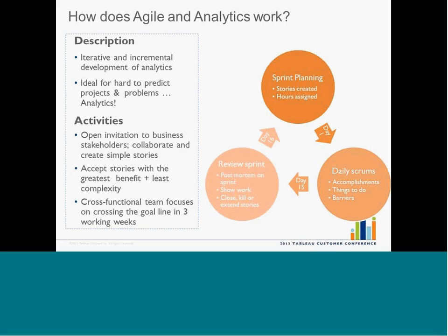So what we do is we set up a sprint planning session for an analytics project. We create the stories, we assign the hours, and the next day we start working. And every day we get together as a team and we figure out what are the accomplishments, what have I done today, what am I going to do tomorrow, and what's stopping me. And we literally have just those 3 questions. We keep doing that until we're done with the sprint, and at day 15, we set aside a couple of hours,